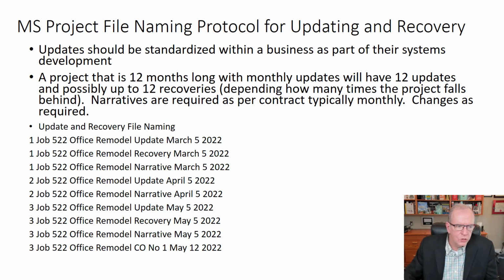So what we're trying to do here, though, with the master schedule, is we'd have the master schedule right off the top. That's the baseline. That we leave alone, we keep that one. And then what we do is we name that file that we just updated, right? The file that we just updated to, I think it was February 4th, 2022 as an example.